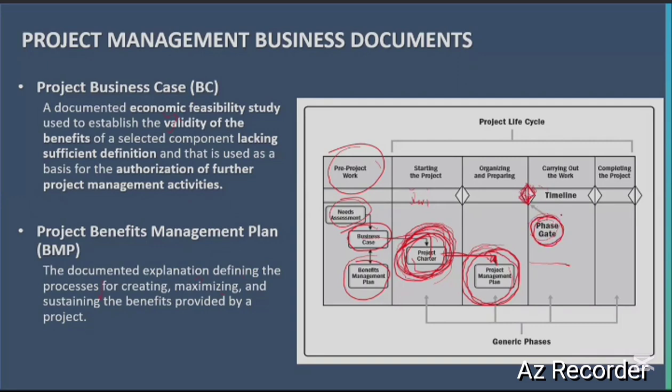So at the end of every stage, we will look back. The term is called stage gating. So we are looking at the potential viability of the project. So we have them rolled out in phases. So phase A is done. We look back. Is the project still viable? We check with the business case. We look into the project charter. Yes, it's still feasible. It's still bankable. We can still carry on. It's still making sense. It's still viable. Let's push to the next phase. Then we go to the next phase.